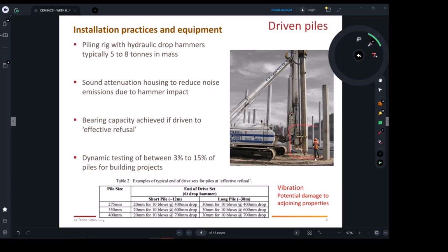So something like this that they're going to be placing around the digging point, and it really helps to reduce the sound and impact when the council will ask for such requirements. I remember when they were building that Western Ring Road, it was too loud. When you drive next to it, you can see the impact, but usually if the sound was not acceptable within limits,